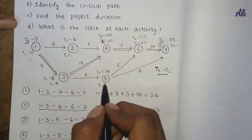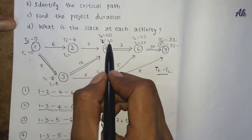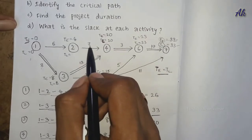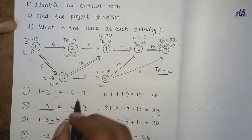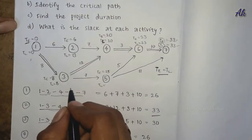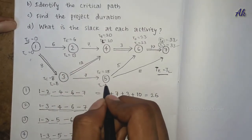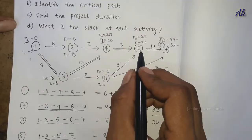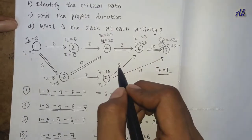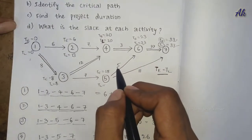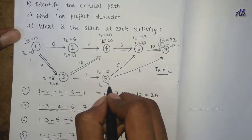For TL calculations of events 2 and 5: TL for event 5 is 23 minus 5 equals 18. We take the minimum value when multiple paths converge at an event.